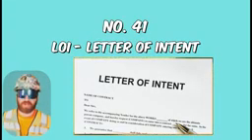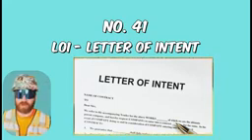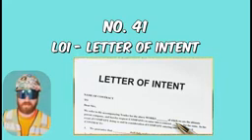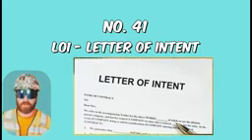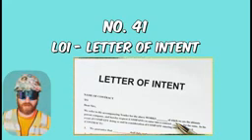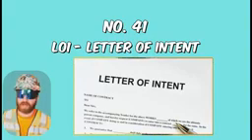Prior to the contract issuance, but to keep the schedule of a project progressing, a letter of intent may be used in good faith to award the contractor so they can move forward with planning and execution of the project. This is followed up with the actual contract.